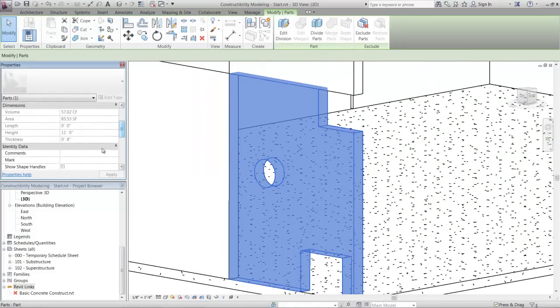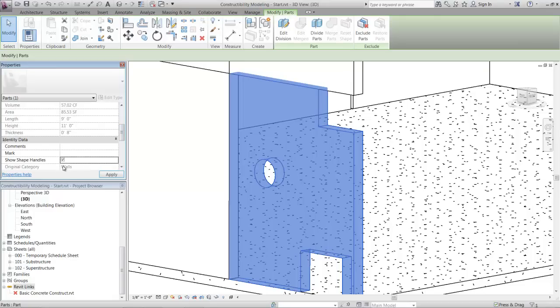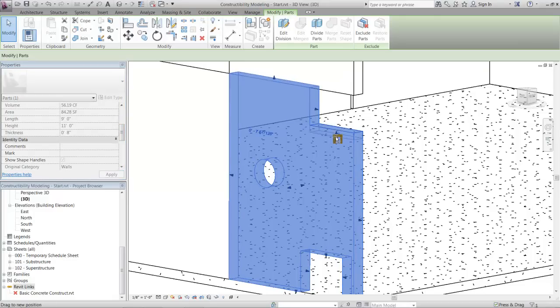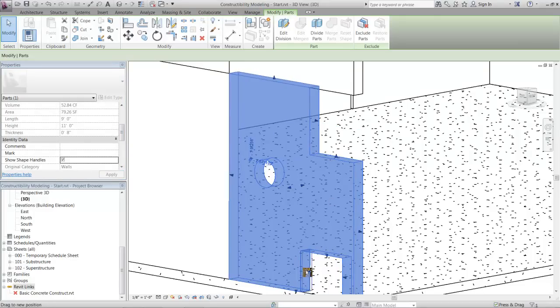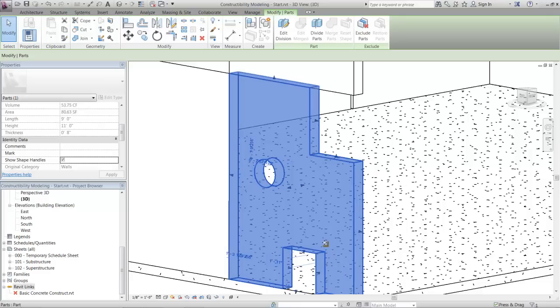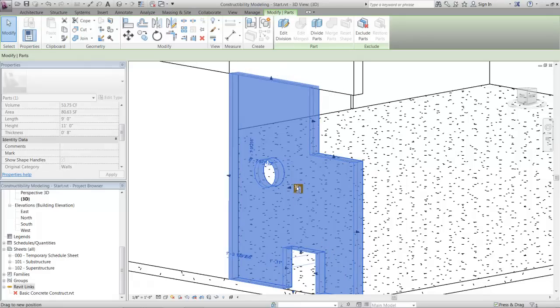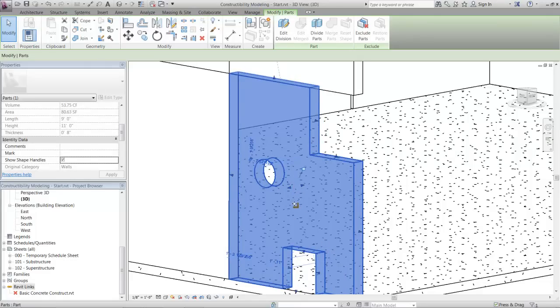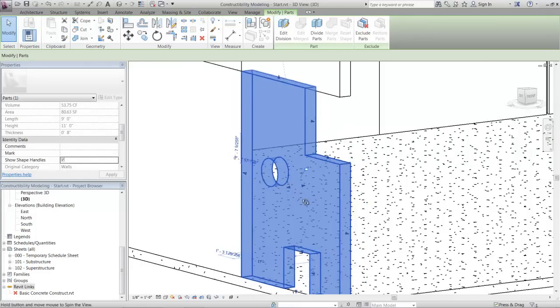Design intent models can be further modified, dividing slabs into individual concrete pores, breaking partitions to show accurate wall construction, or merging components together to better represent how the elements will be constructed in the field.